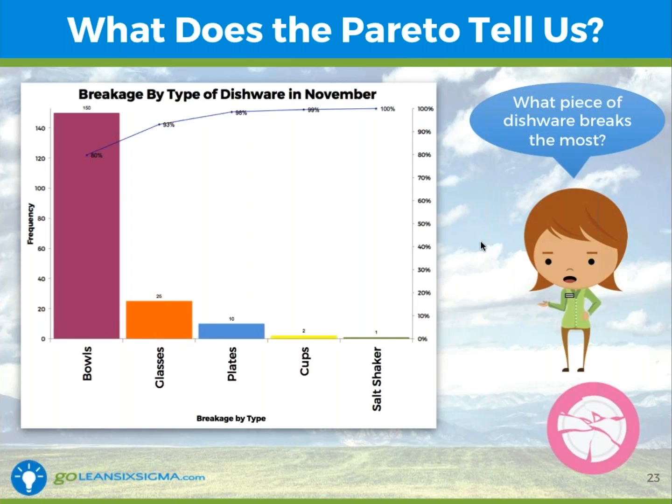This chart caused them to change the project scope. So they narrowed it down to just deal with broken bowls. Paretos are a great way to highlight data. They help others see at a glance the biggest source of problems. They can also be used to dig deeper.